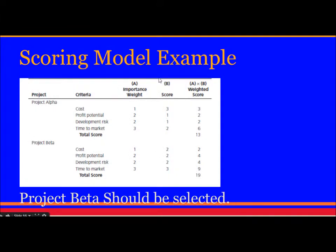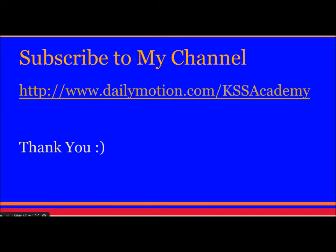This is an example of a scoring model. The scoring model has certain criteria to which we assign scores and weights, then calculate the weighted score and total. Whichever project gets the highest total score is selected. In this example, Project Beta scored 19 while Project Alpha scored 13, so Project Beta is the better and selected project.